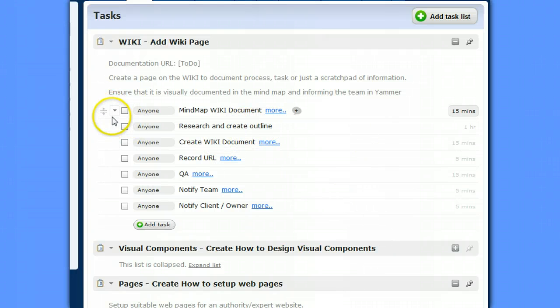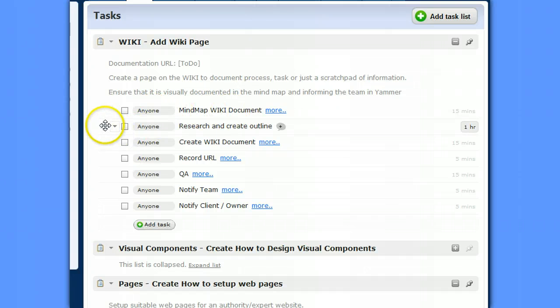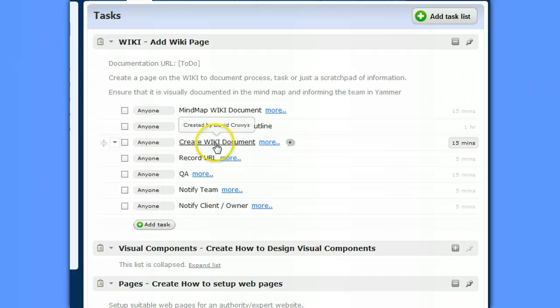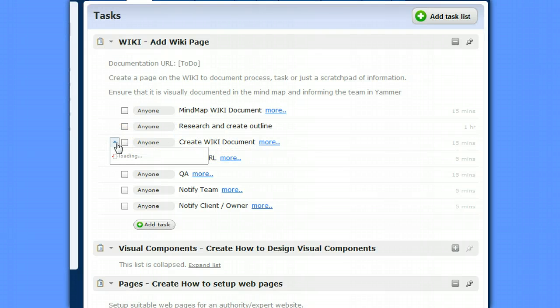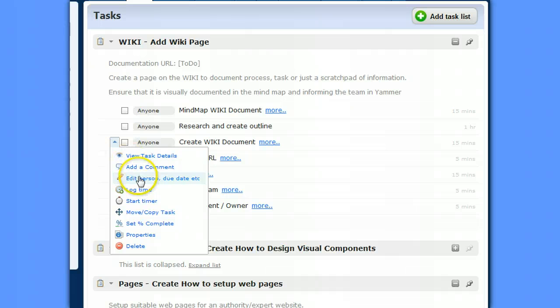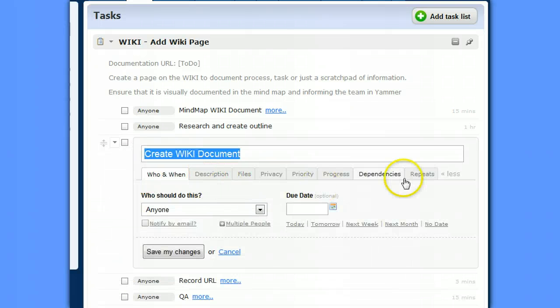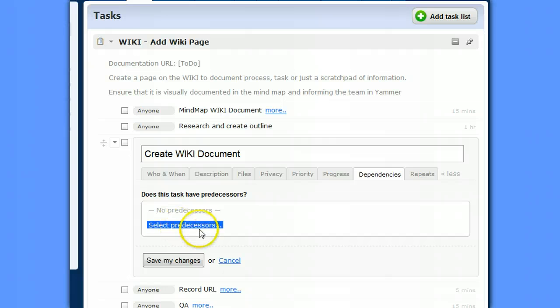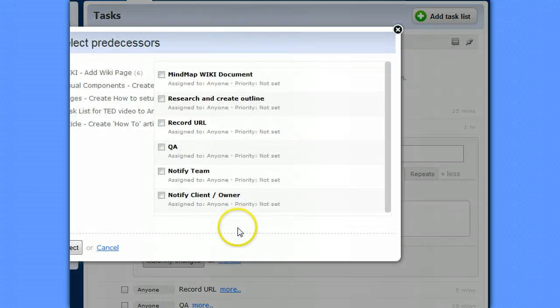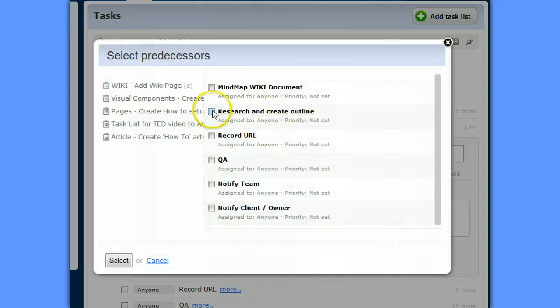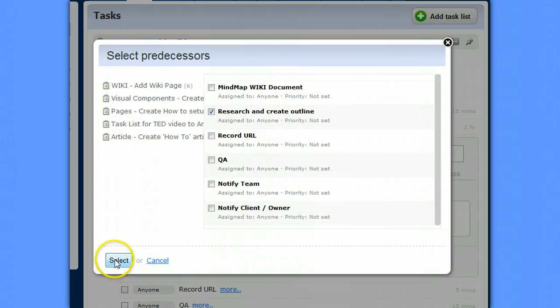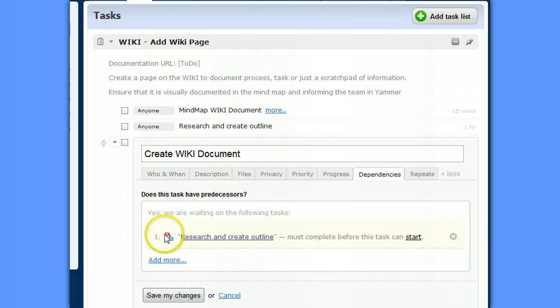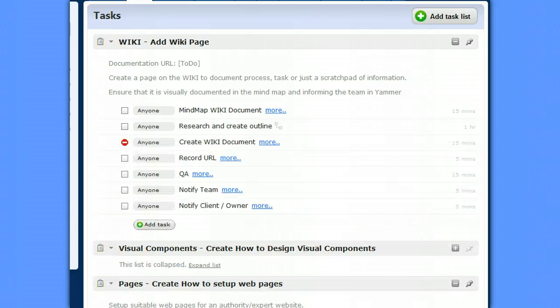So the way you do that is you don't need to worry about the first one. Go to the second one. So the research can be done, well they can be done together so they're fine, but the creation of the document can't be done until after this one. So we click on here, go to Edit Person, go to Dependencies, and set a predecessor. So creation of the wiki document is based on research and create outline. So there's now a dependency. We'll save our changes. So I'll do that for each of them.